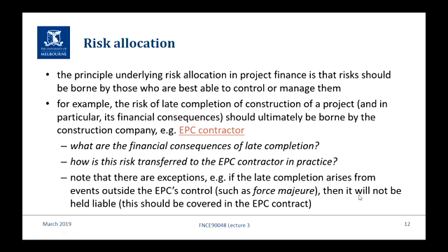There are exceptions, of course, if it's outside the EPC contractor's control, such as a force majeure risk that shut down the construction for a while, then they're not going to be held liable, but that'll be in the contract as well. But at least one way or another, you are ensuring that construction is done and the risk of construction is borne by the construction company.